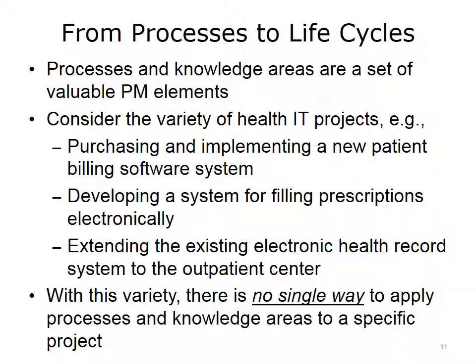Now we will talk about the transition to life cycles. Although the identification of process groups of initiating, planning, and so forth suggests that these process groups occur in a sequential order, it doesn't actually happen that way. The processes in these groups can be applied throughout the project as they are needed. In health IT projects, there is no single way to place all the activities and processes into some chronological order so that it is appropriate for all projects. This is where your judgment as a project manager will come into play.